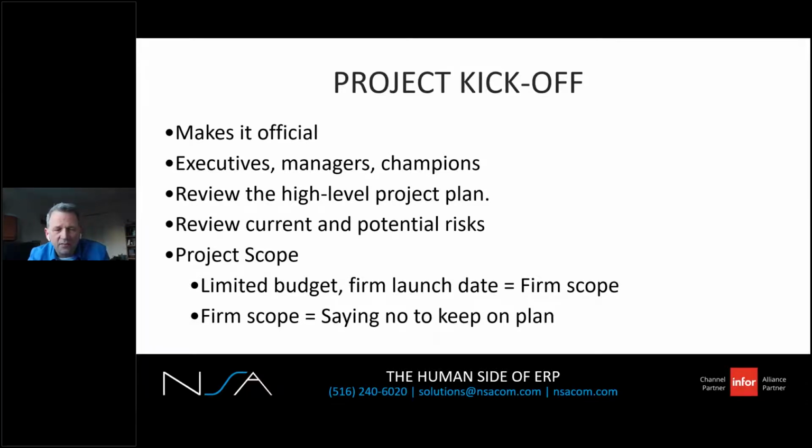So a kickoff is a meeting of all the stakeholders. So it's your executives, your project team, both internal and external, including your champions. Get them together, do this early. It makes the project official, and it sends the message that this project is a priority and has executive support. Every meeting should have an agenda.